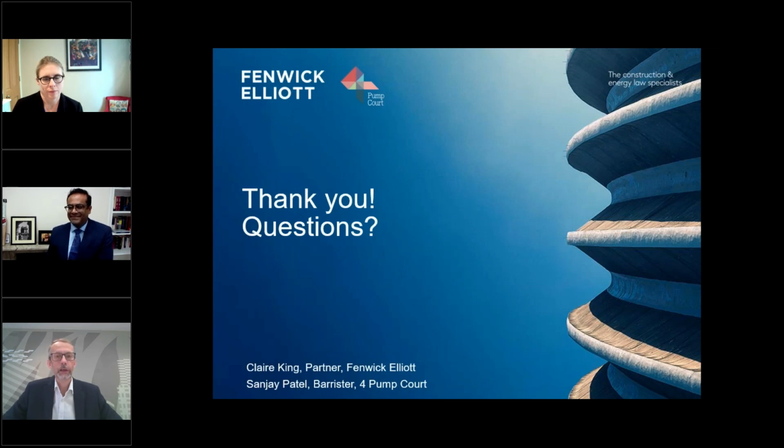Okay, Claire, is there anything you wanted to add? I'd just say, in my experience in adjudications, adjudicators want to know that these costs were actually incurred and have evidence of that causation. I think people feel very uncomfortable with just relying on forecasts, especially if they're on the high side, when they know that two years later, you've got the records and we know what actually happened. There's a bit of unease to do anything else. But that's just a practical perspective rather than a legal one.